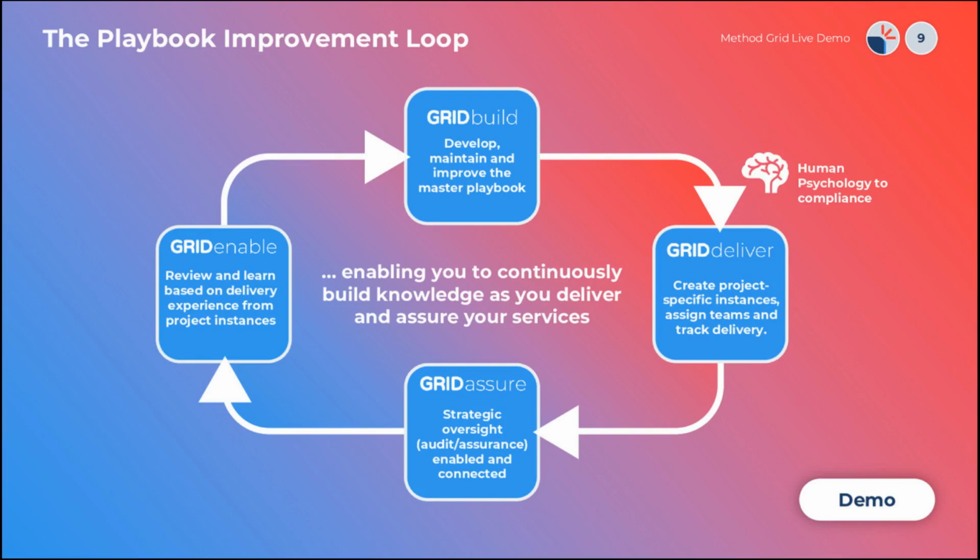Once you've built a playbook, you then have the ability to clone it. That creates an instance which you can give to a project manager, and say, look, I've given you, I think, 80% of what you need, but please can you go and have a conversation with the team, the client, the different stakeholders, and just right-size this playbook relevant to the project so they can adjust it and tailor it.